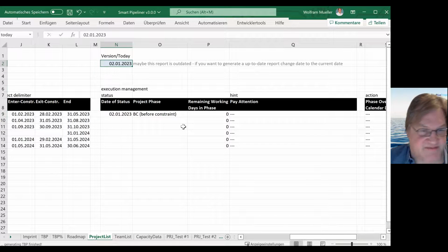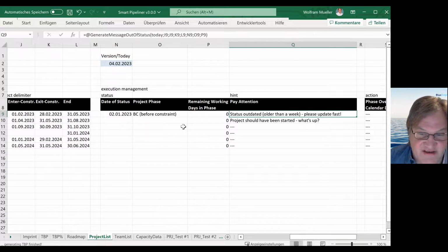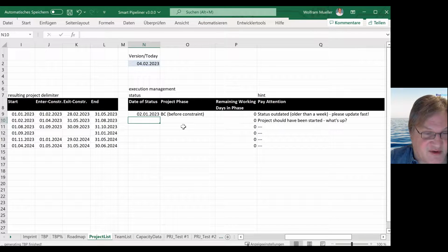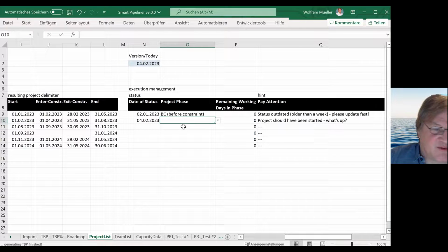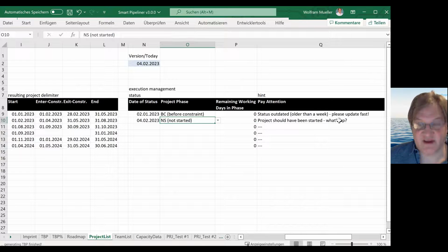Maybe we are a month later, the 4th of February. And of course, the project status is outdated, and you see another message. This project has to be started. So this project has to be started on the 1st of February. So, okay, then you can go to the project manager and ask, of course, what's up? And he will say, of course, no, we are not started. Oh, then you know you are too late. You have to do something.